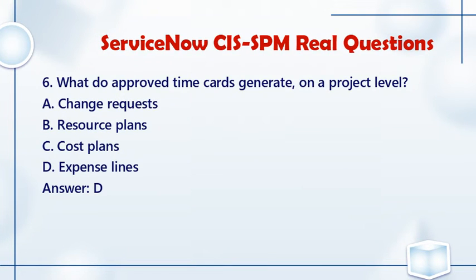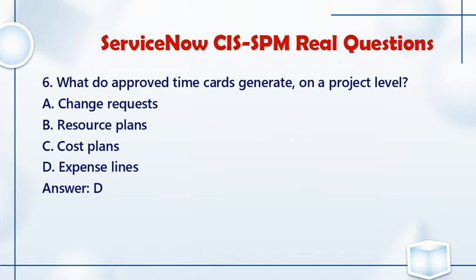Question 6: What do approved time cards generate on a project level? a. Change requests. b. Resource plans. c. Cost plans. d. Expense lines. Answer: D.